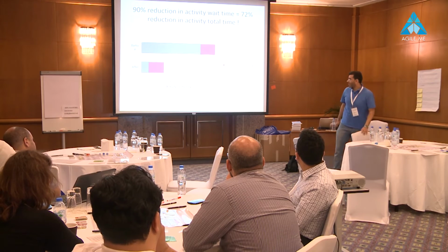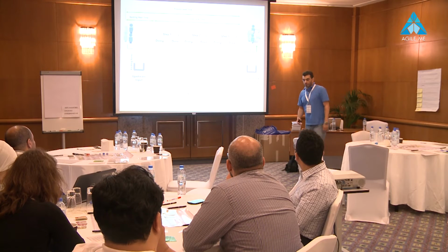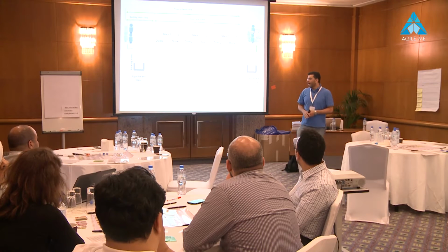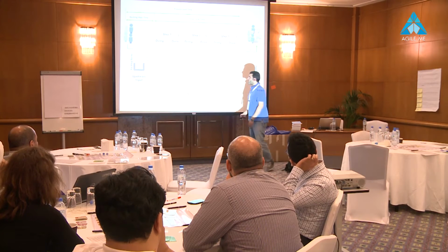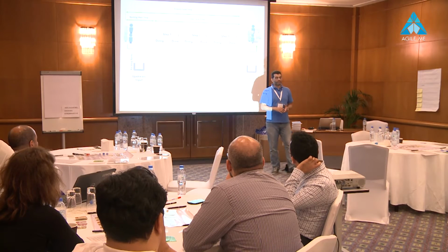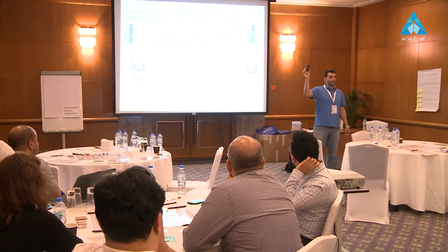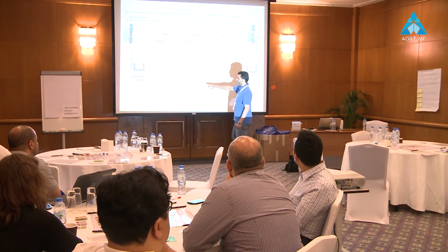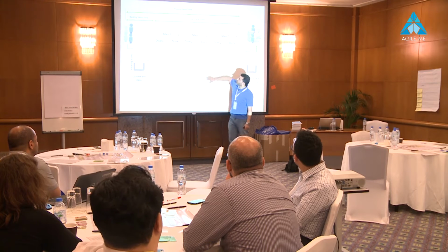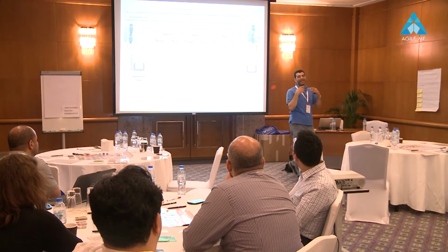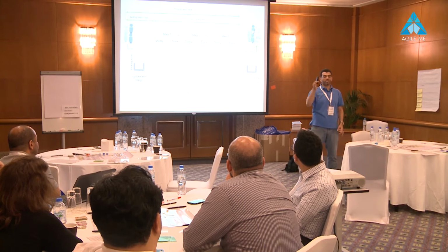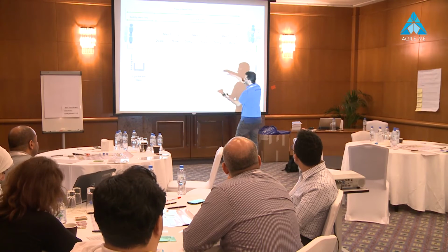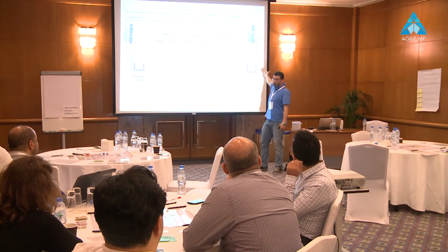Agree? Okay. Now, in order to do that, one of the techniques that people use in lean software development and in development in general is to limit the amount of work in process. So imagine that we are producing something like this, and we are not taking into consideration a bottleneck which happens here. This bottleneck piles up in the done column a lot of partially done work. So probably things are not integrated. Okay? At the end of the day, how much waste are we producing? We are producing a lot of partially done work here, while actually there is no cash at the end. Okay?